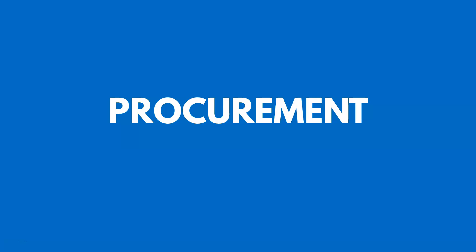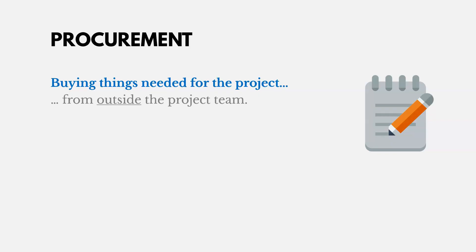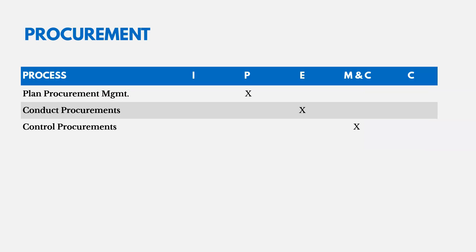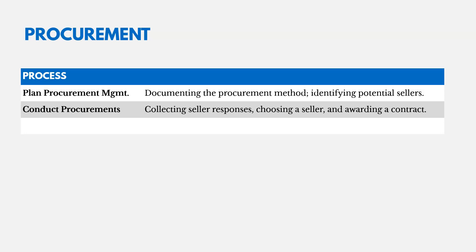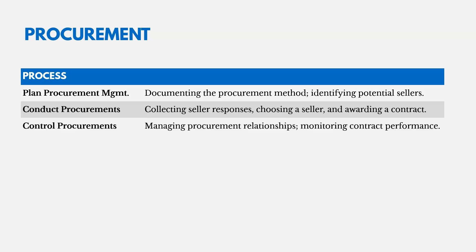Procurement management involves buying things needed for the project from outside our own team. There are three processes: one in planning, one in executing, and one in monitoring and controlling. We plan procurement management by documenting the procurement method, identifying what we need from outside sellers and potential sellers. We conduct procurements by collecting responses from sellers, choosing one, and awarding a contract. Then we control procurements by managing those relationships and monitoring contract performance.